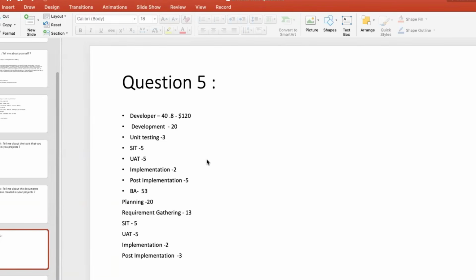So if your project is already allocated and the team is working on it, and you get new requirements, how will you handle that? If there is scope creep, or an increase in scope, usually we have to talk with the engineers and see if this is a simple thing that can be added to the existing requirements, or if it needs an additional LOE. If it's a brand new request, the same process applies. If they can accommodate it within the initial request, then that's fine. But if the engineers think this is going to take another 13 points, 20 points, then